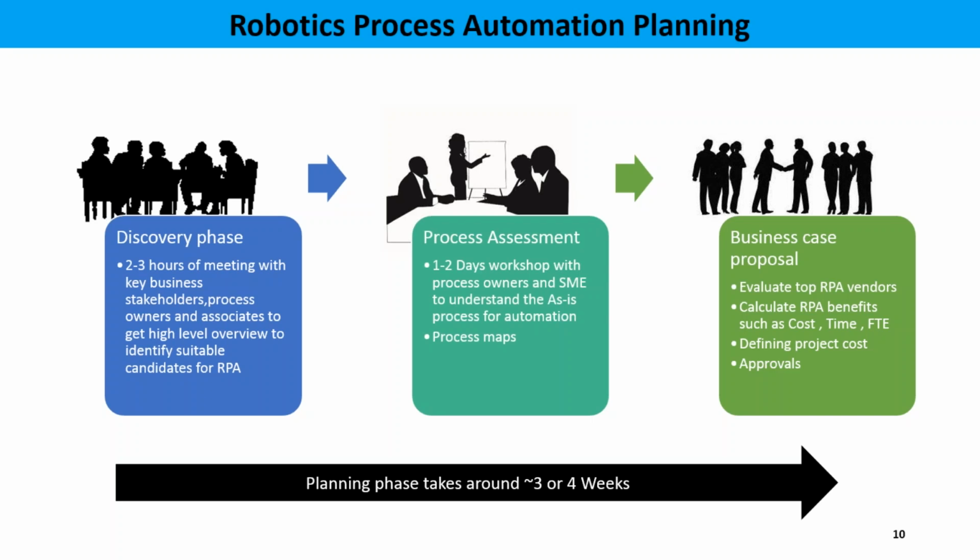In the discovery phase, what we basically do is have 2 to 3 hours of meeting with the key business stakeholders who can give us the idea of what the process is about. We have to do a high level description. We have to sit with the client, with the higher professionals from the client, and understand the high level processes. That comes under the discovery phase. Then next comes your process assessment.